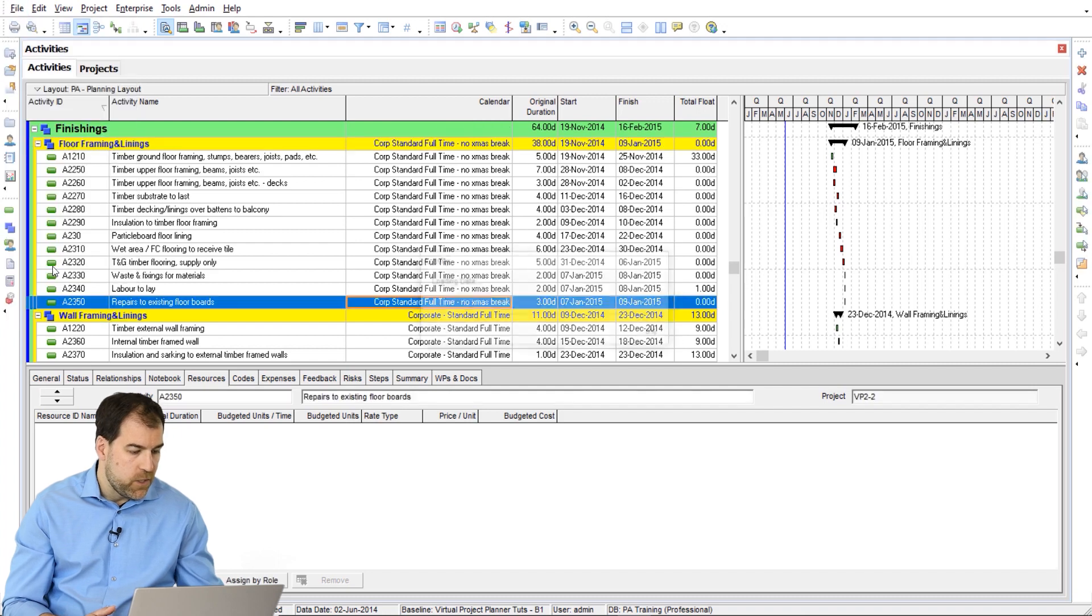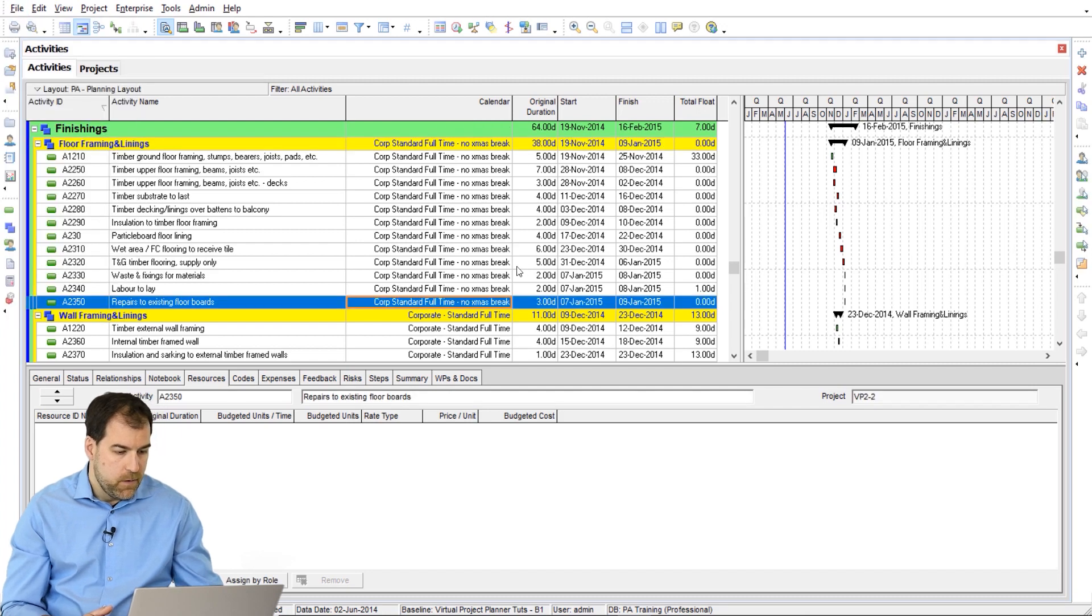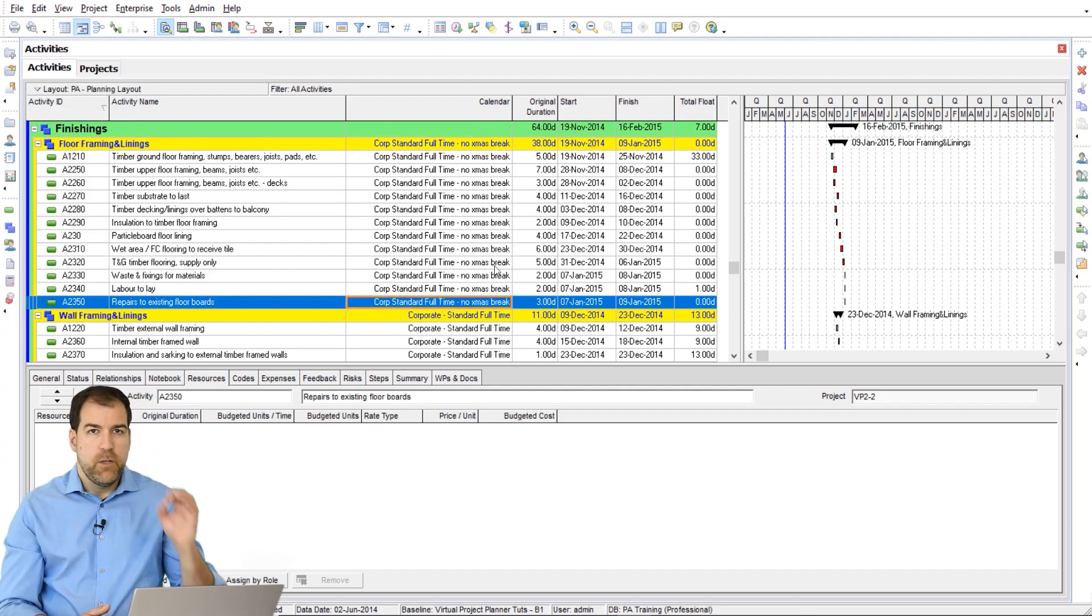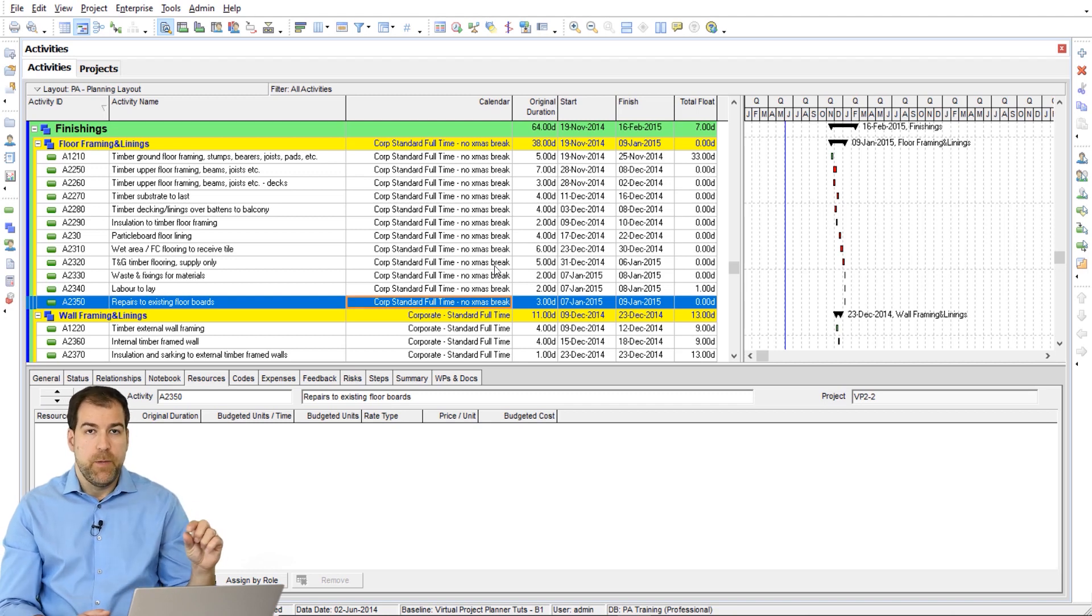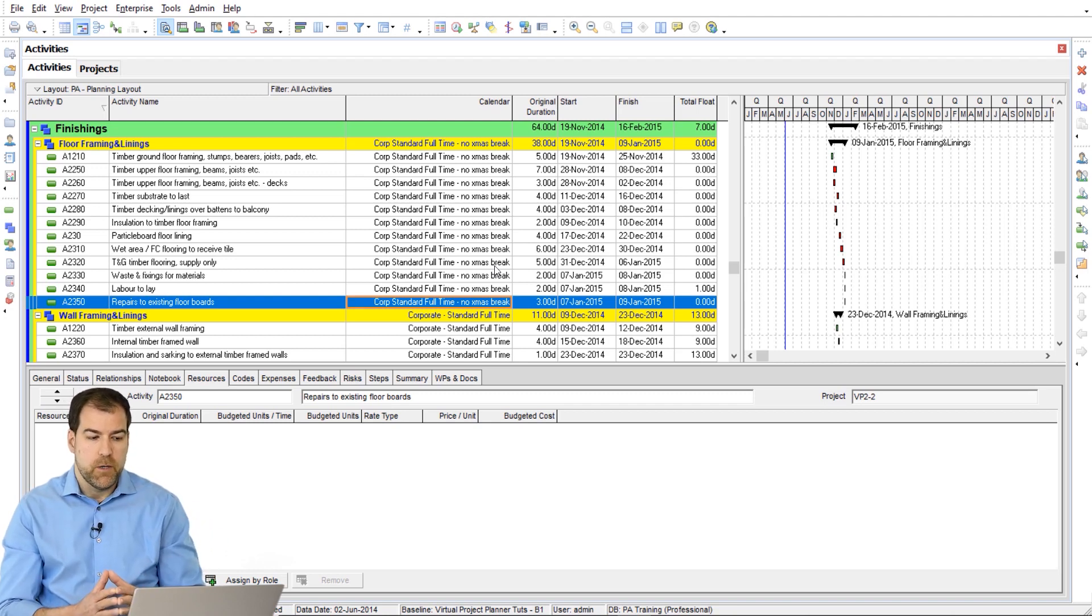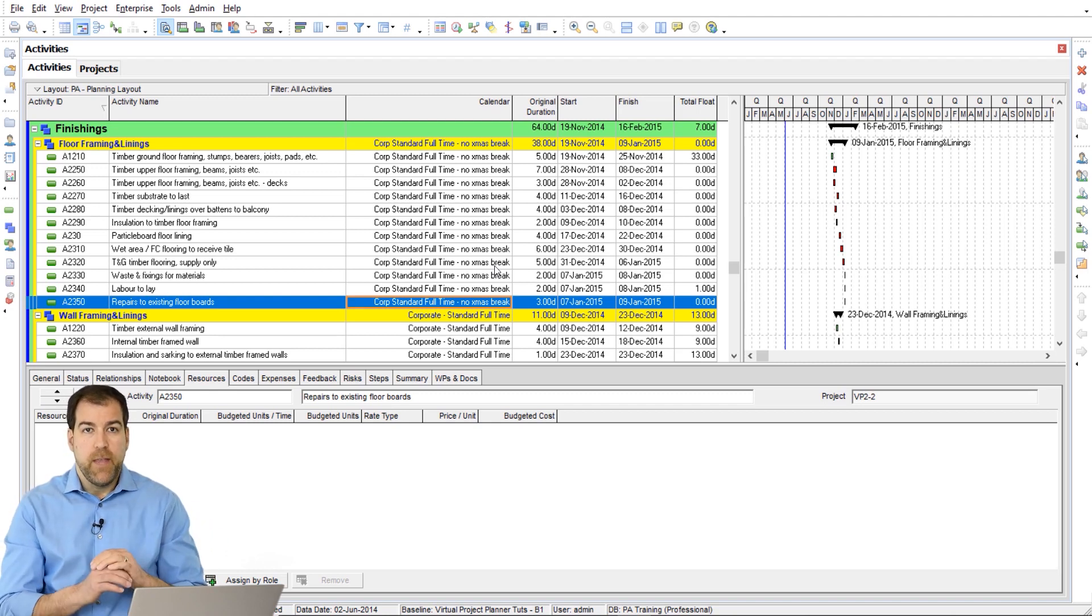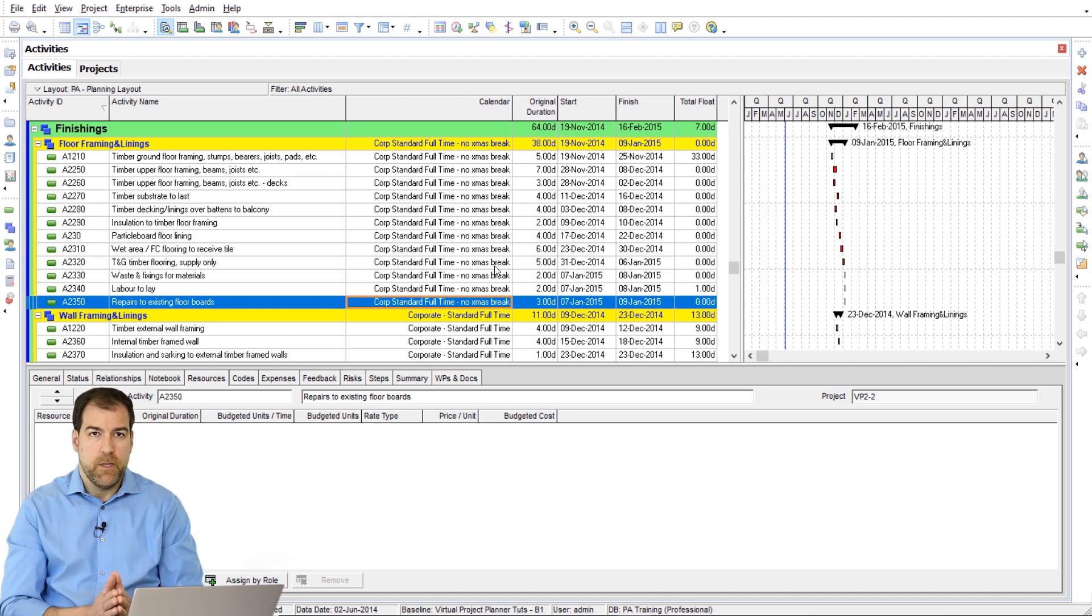Refresh data. When I do an F5, P6 recalculates the summary information on the WBS bars. So sometimes that totally fixes your problem.